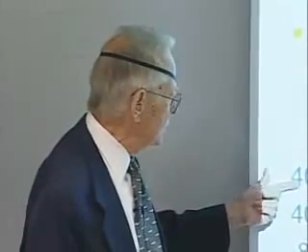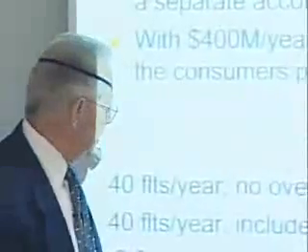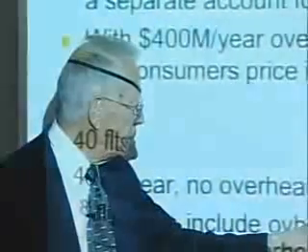40 flights a year, no overhead. In other words, like Apollo, a $10 million price in 1970 would be $23 million by first flight and would be $50 million now. Same 40 flights, but including overhead, would make the flight cost $20 million in 1970, 45 in 81, and 101 per flight for 40 flights in 2005. Huge increase in price because of the inflation that occurred in the 1980 to 82 time period.